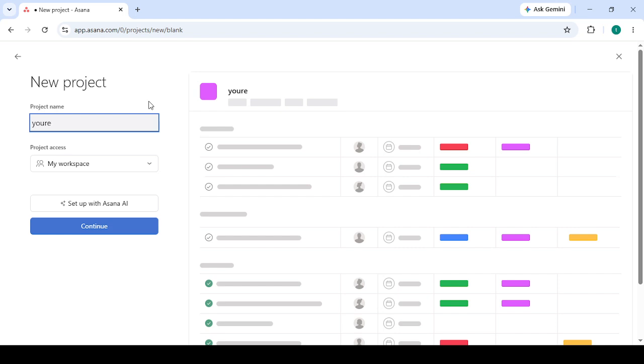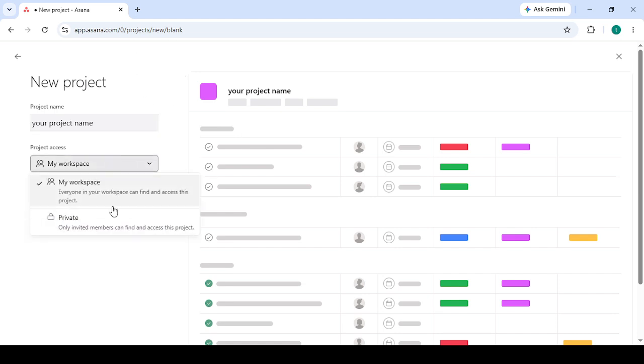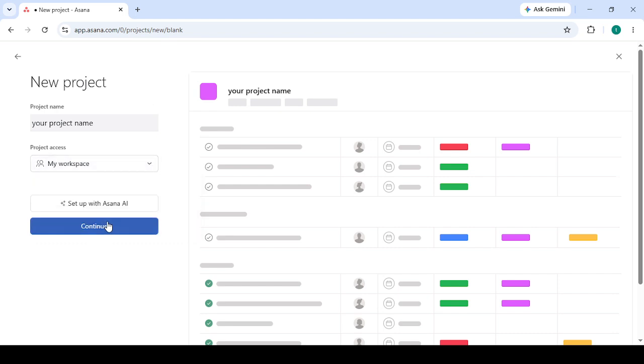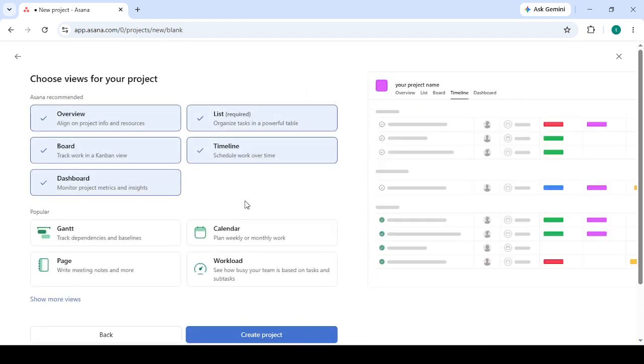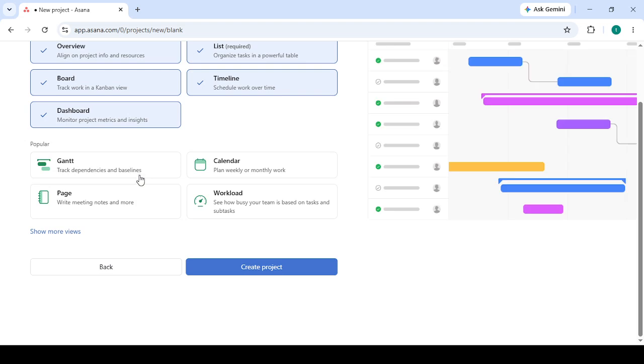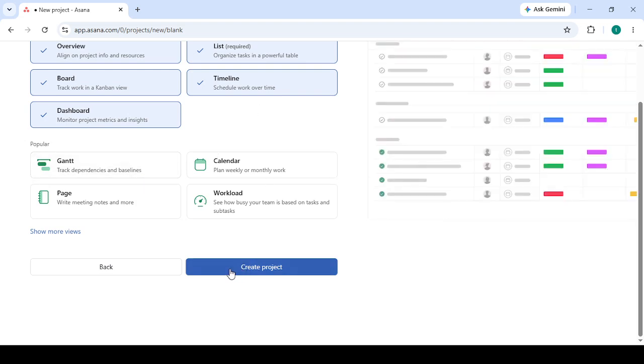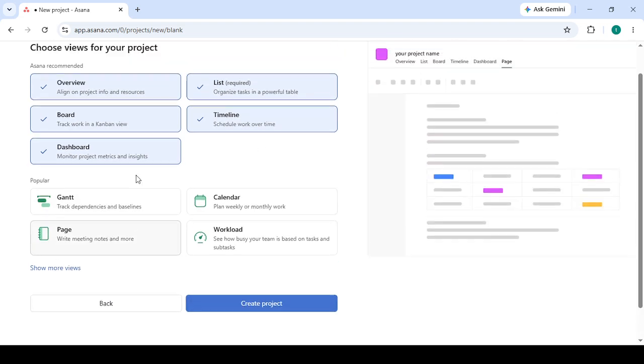After your phase sections are in place, begin adding tasks inside each phase section. Under Discovery, you might include early planning or research tasks. Under Execution, add the tasks related to building, producing, or carrying out the work. Then under Launch, place the final rollout or completion tasks. The key here is to make sure each task lives in the correct phase so the structure reflects the real flow of your project.